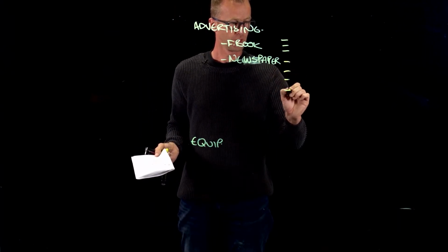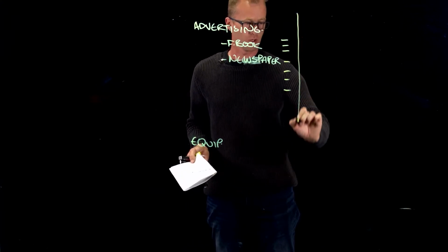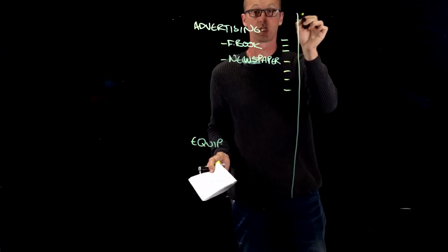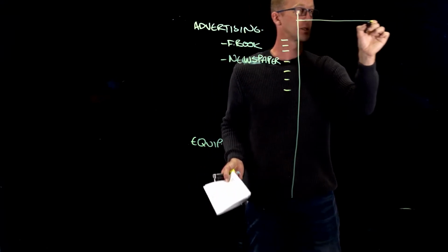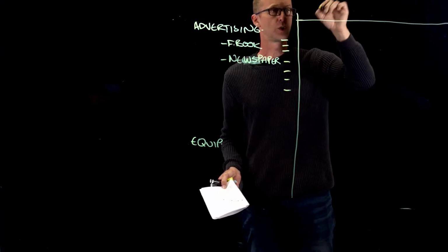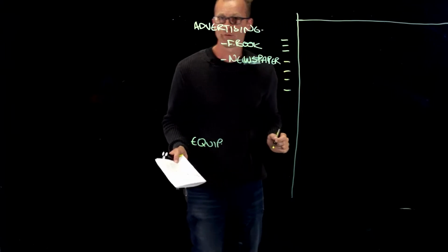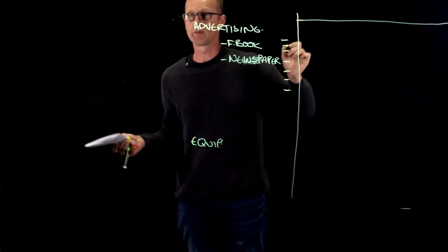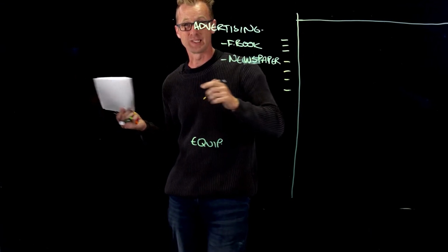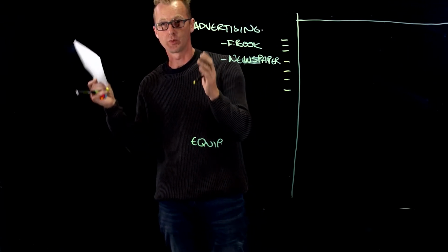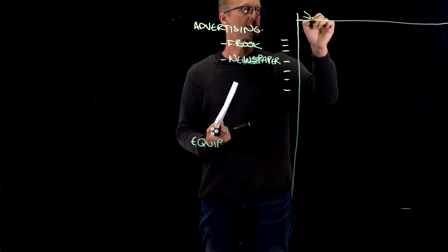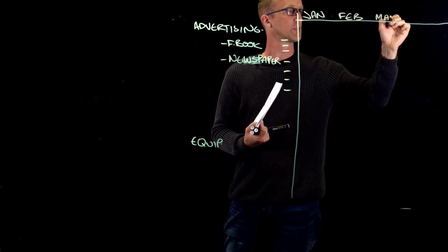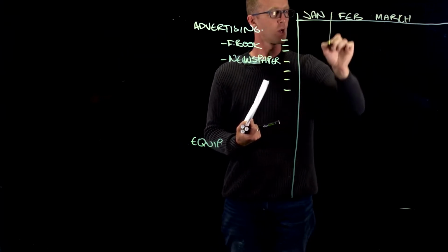Now, the issue we're trying to solve is the timeline. You can do it on a piece of paper as a group with sticky notes, or you can do it in Excel or Word, both of those work. You want to think about your dates. If you're organising an event that goes over months, the months are going to be at the top, but if you've got a two-week plan, it'll be days. Very rarely would you do a Gantt chart for something within a day. Generally, it's longer-term projects. But let's say we've got January, February, March. So we're mapping how long we've got to get things done.